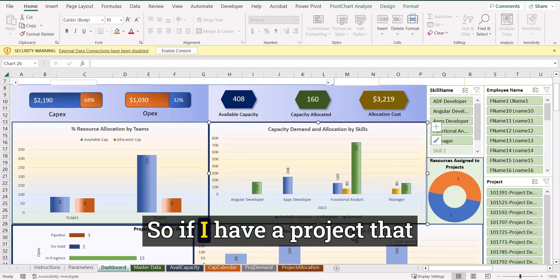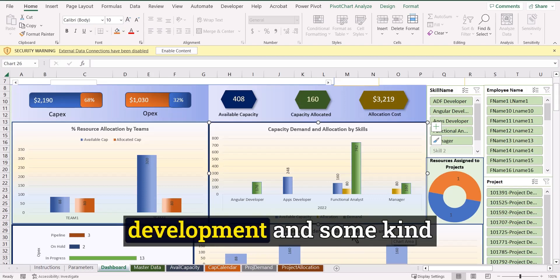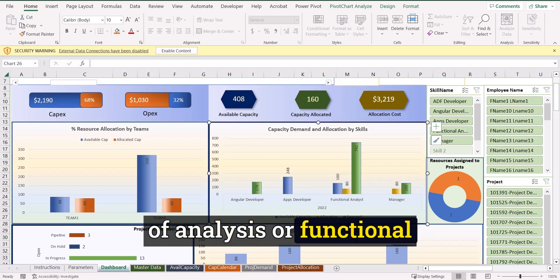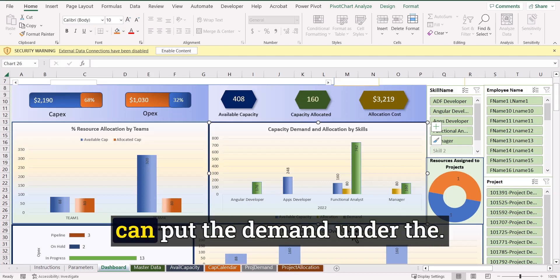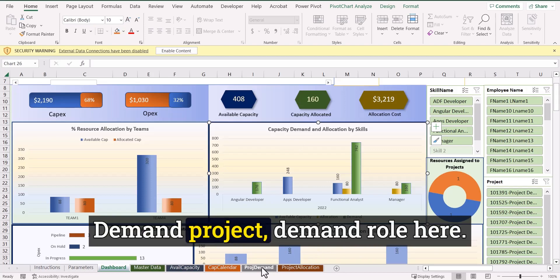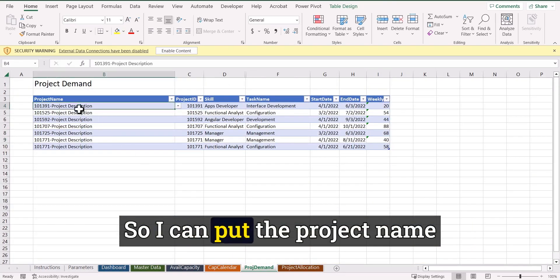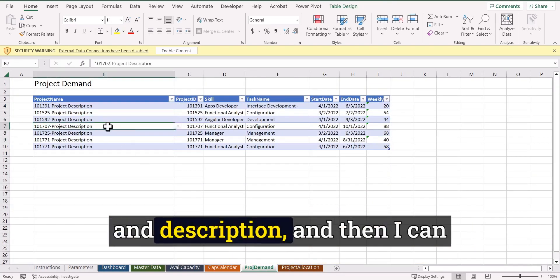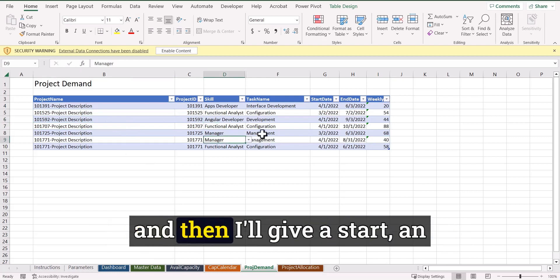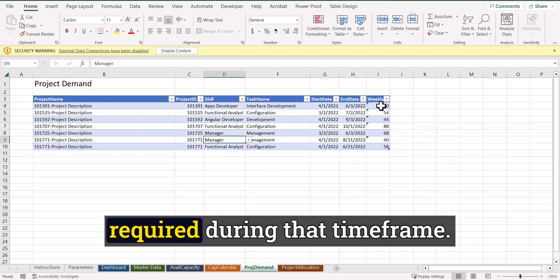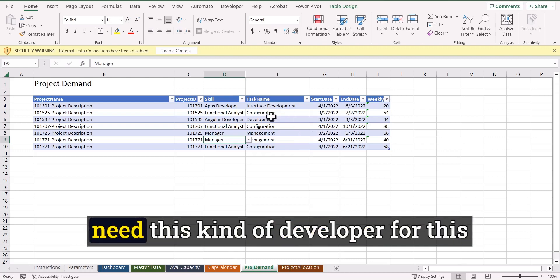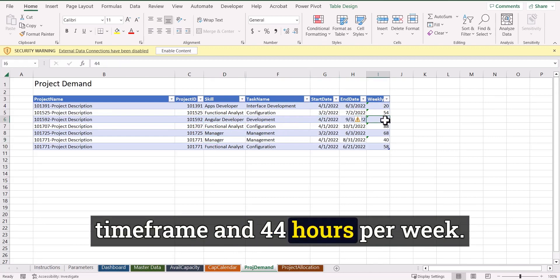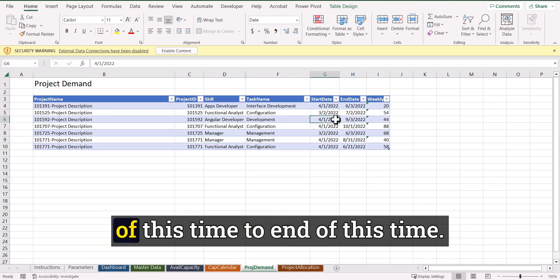So if I have a project that is requiring some kind of development and some kind of analysis or functional analyst or a manager roles, so I can add a particular skill set and then I'll give a start and end date and the weekly hours required during that time. So in this case, I have this project and need this kind of developer for this time frame and 44 hours per week. So this is per week from starting of this time to end of this time.